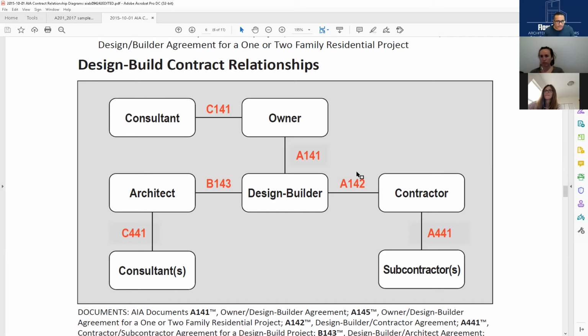I guess again the learning is my sub should have immediately told me, because that's what the 8201 says. If you find any conditions that materially differ from the normal, the typical, then you tell the architect. The architect will go and inspect the work and see if it actually does differ from what was ordinarily found there. And if it is not a change, then it's like proceed. That's nothing abnormal. But the other option would have been, yeah, it is completely bizarre. It's just not normal. So they are entitled to additional service.